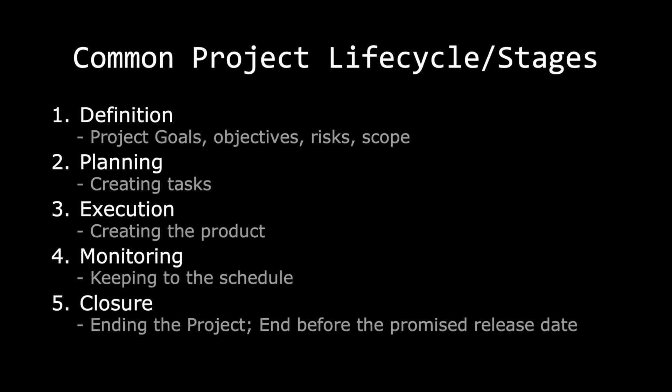In reality, each step has clear and concise goals. In the first step, definition, what you're really trying to do is outline your project goals, your objectives, the risks, and your project scope. After you have defined everything, you move on to creating tasks — you take your project goal and create requirements that you need to fulfill. After you have created your requirements, you move on to the execution step, which is simply creating and testing your product. While execution is happening, you are also monitoring it. If you are ahead of schedule you may want to add more requirements, and if you are behind schedule you may want to remove requirements. Lastly, the project cannot continue forever — at some point you must say the product we have now is good enough and end the project.